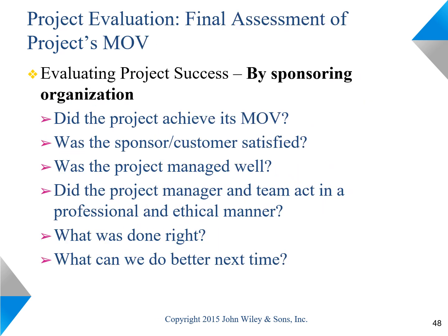There are several ways that organizations evaluate projects after they are completed or closed. One is called assessment of the project's MOV, and that is typically done by the sponsoring organization, the organization that paid for the project. The questions they ask are: did the project achieve its MOV?